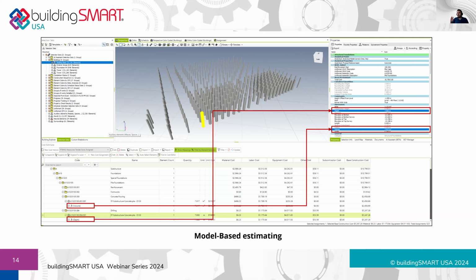And that's why you should, I would say, pick your battles very well. So you need to model to a certain level of detail the elements that are the most costly, that are most prone to possible mistakes, and that are most risky for the execution.